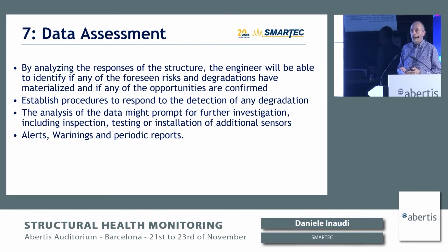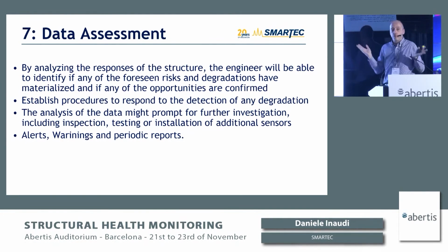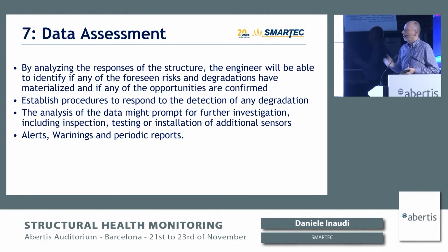Because one day it will go off, and you need to know what to do about it. It can be close down the bridge immediately, or it can be write a report in the next 2 years. These are two very justified outcomes of measuring something out of range. So everybody needs to be clear what happens if we exceed a certain threshold.